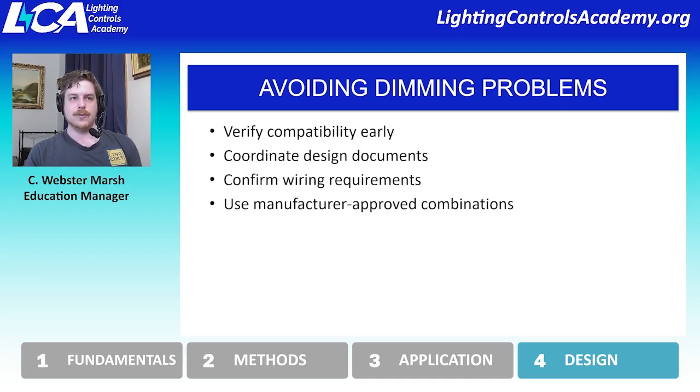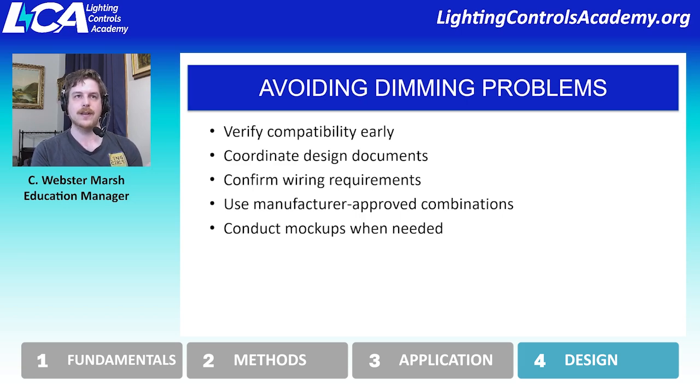And make sure to coordinate with the manufacturer. Always double check with the manufacturer that the combinations you're working with are approved by them, or at least considered, and they say yes, that should work. If they say should, then I highly recommend you do a mock-up. But odds are the manufacturer is going to say yes, we've tested that before and this works, or we've tested that before and it doesn't work, or no, we haven't tested that and we can't tell you one way or the other. So doing those mock-ups really does support that goal of avoiding those dimming problems.